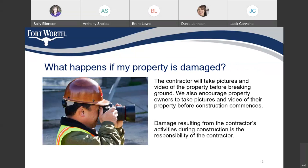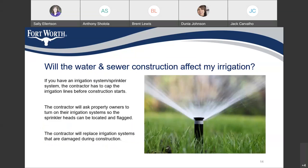What happens if my property is damaged? The contractor will take pictures and video of the property before breaking ground. We also encourage property owners to take pictures and video of their property before construction commences. Damage resulting from the contractor's activity during construction is the responsibility of the contractor. Will the water and sewer construction affect my irrigation? If you have an irrigation system or sprinkler system, the contractor has to cap the irrigation lines before construction starts. The contractor will ask property owners to turn on their irrigation system so the sprinkler heads can be located and flagged. The contractor will replace irrigation systems that are damaged during construction.